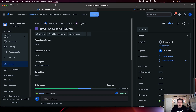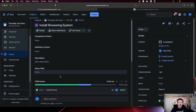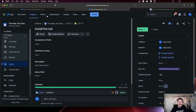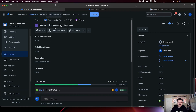Now, normally when you are inside of a story — I'm going to open up a story real quick just for the purpose of this demonstration — when you are inside of a story, you have the button to create a subtask. This is natural, intended behavior. Subtasks belong to stories, tasks, or bugs. That is just how Jira works. But when we go over to the Epic, you'll notice that we don't have a button for that.